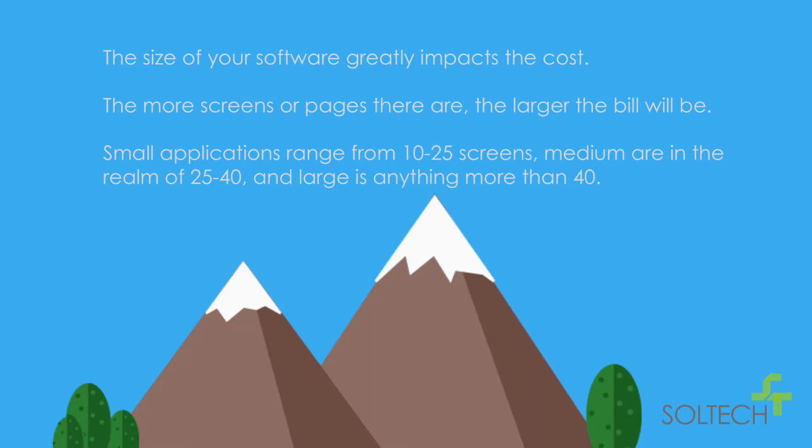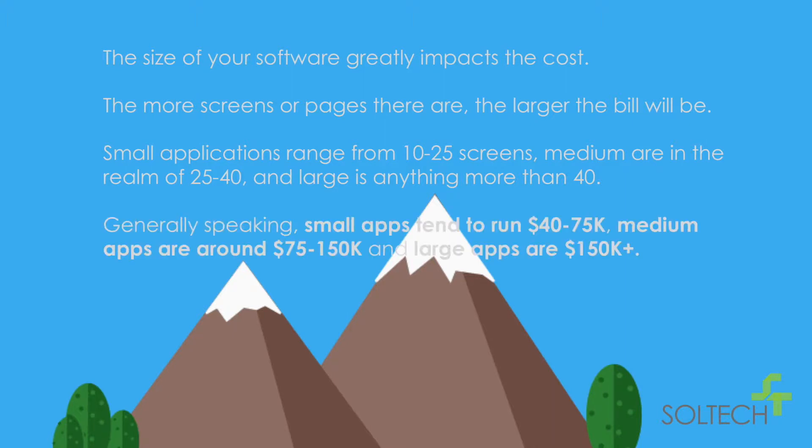Small applications range from 10 to 25 screens, medium are in the realm of 25 to 40, and large is anything more than 40 screens. Generally speaking, small apps tend to run $40,000 to $75,000, medium apps are around $75,000 to $150,000, and large apps are $150,000 and up.